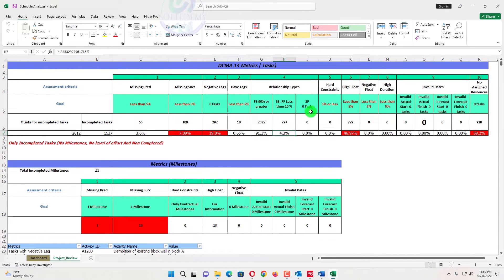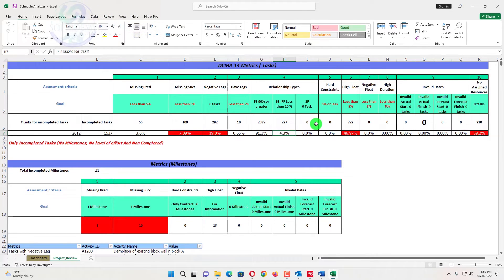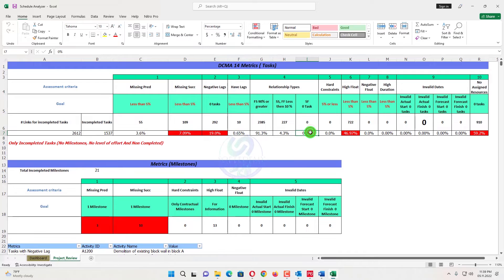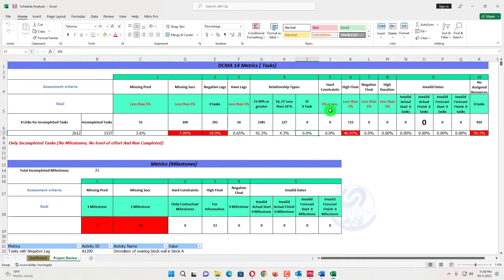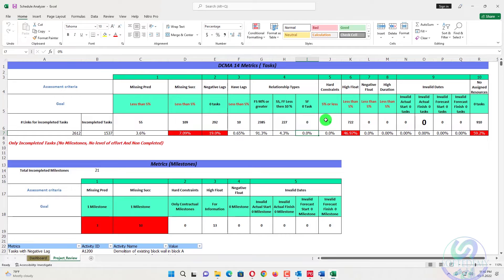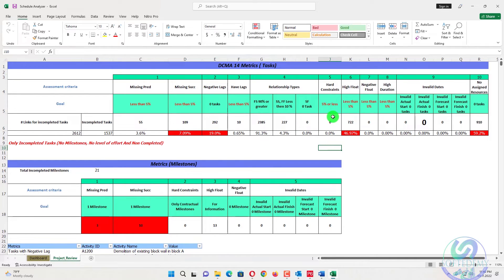Also start to finish task. There should not be any start to finish task because start to finish task is very, very difficult, considered as an open ended. Also out of sequence chances are increased in that case. So that's why it should be zero. So in this case, also zero percent and zero activity. No hard constraints. Hard constraints are not assigned like a mandatory finish or mandatory start because mandatory start and mandatory finish also remove the critical path and it turn that one whole the path into zero float. So it should be zero and should be less than 5%. And in this case, it's zero and it's acceptable.